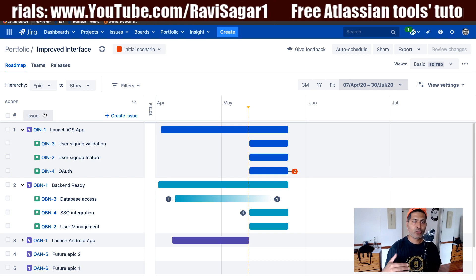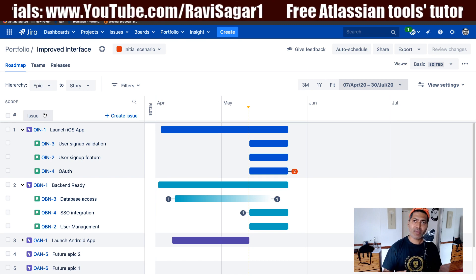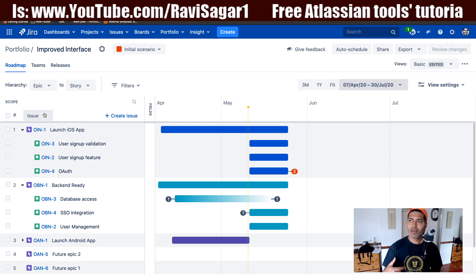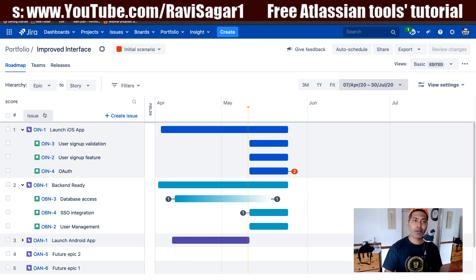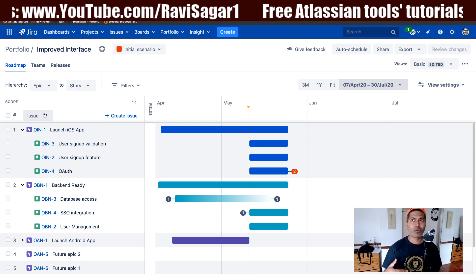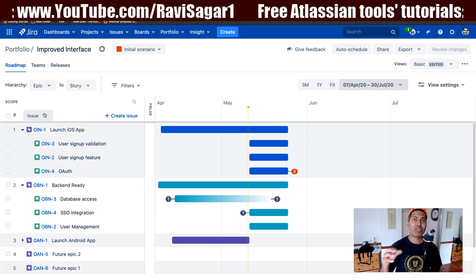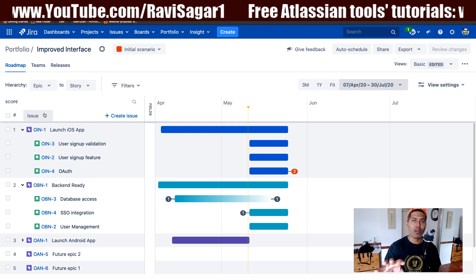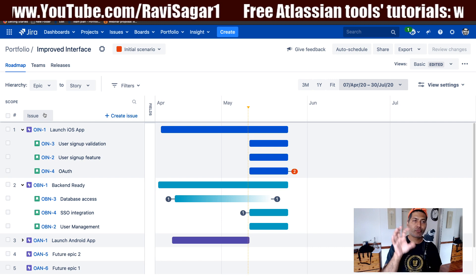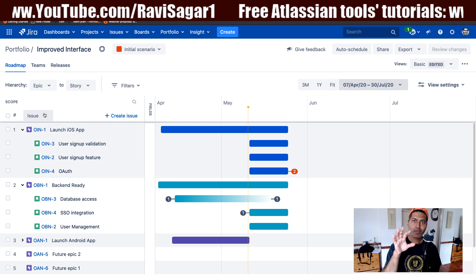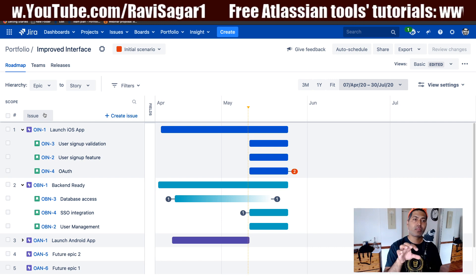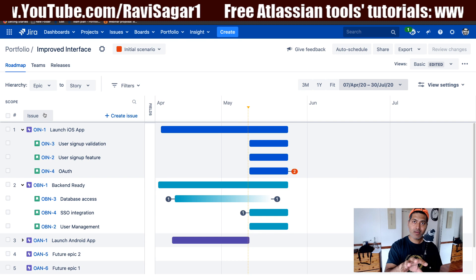This is actually a bit different in the life plan. So if I now focus on stories again, you have the same order, the same rank that was there from the very beginning. The point here is: if you're working with the improved interface in Portfolio for Jira, the ranking will only be applicable at the same level — it won't really affect the rank of all the children under that particular level. So if you change the order of the epic, the order of the stories under it will not be reflected, especially when people are working at the board level.